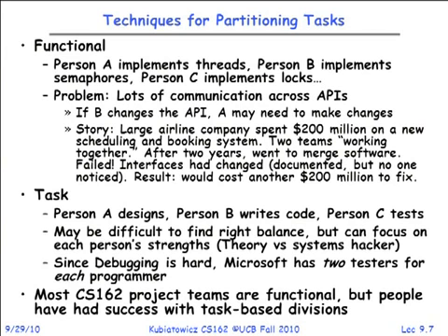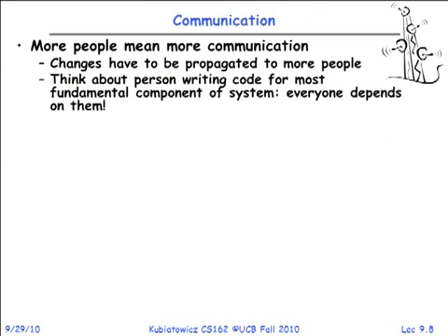Now, the more people you've got, the more communication. If nothing else, you've got n squared possible links. I suppose that goes without saying, but I should say it. So basically, you've got a problem which grows as n squared, probably grows much worse than that, as the number of people in a team grows.